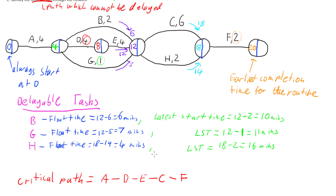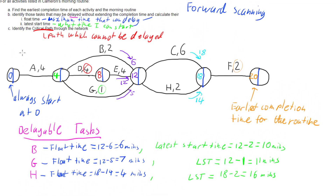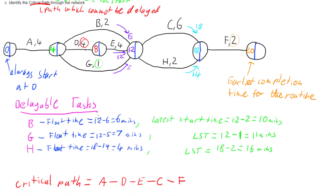The critical path means I have to start A at zero, D at four, E at eight, C at twelve, and F at eighteen minutes, to finish at that earliest completion time of twenty minutes. So that's forward scanning. The trick is simple: split nodes in two, work out the earliest completion time of each node, then identify which things can be delayed, how long you can delay them for, how late you must start them, and what the critical path through the network is - the important sequence that cannot be delayed and must happen on time, every time.